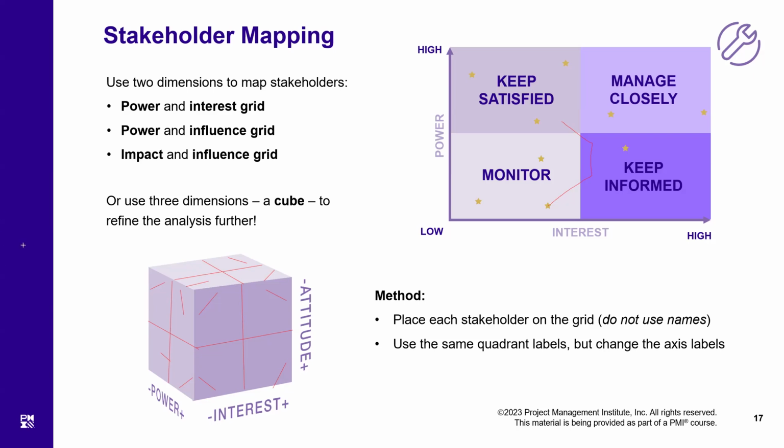So that is exactly what we do in the third dimension. Although you may not be using the third dimension often, only in rare cases where we are dealing with a very sensitive project where your stakeholders might have to be judged on more than two parameters, and then you have to make decisions and create your strategy to deal with different groups of stakeholders. So in a cube, you will have 8 different strategies. Right, so this was what we covered yesterday.